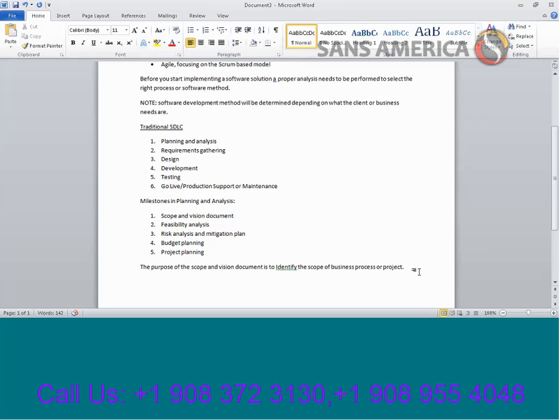You need to mention this very clearly, because if I make a simple statement saying I'm going to give you funds transfer, out of this statement I can make 3 assumptions. I can assume that you are allowing me to transfer internally, within the bank. You are allowing me to transfer funds externally, outside the bank. Number 3, I can also assume that you are allowing me to transfer funds internationally, outside the country also. So as a stakeholder, I can make 3 assumptions.